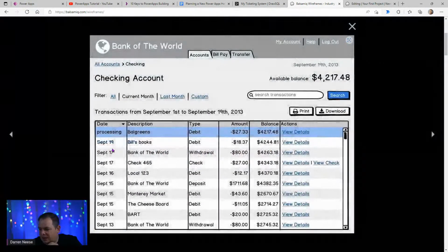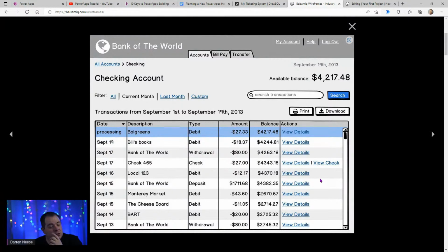let me see if I can click on this. There we go. Look at that. If you present to them something like this, it's obvious that this is a rough sketch. And it's very obvious. They're like, oh yeah, well, we might need another button in there to take care of X, Y, or Z. And you're like, oh, well, you didn't tell me about that. So listen, I'm going to tell you a secret here, and you might think there's an exception, but there's not. And the statement is this: when the customer, the client, looks at a screen, that's when you get the rest of your requirements.